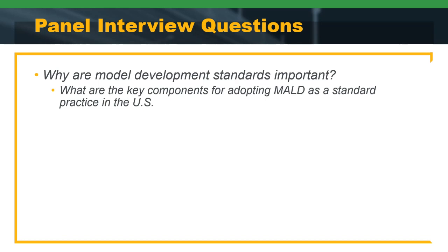But the pieces that we talk about, we take and we look at a foundational definition for level of development, and then we look at a model element breakdown structure, which is like a table of all the elements you might have on a project. But it's important that those are at an element level and not necessarily at an entire model, because Eric needs to know which elements, kind of like the chicken, right? If part of the chicken's bad, then he's not going to eat the whole thing. Well, in our case, we have multiple elements, so we need to let them know which parts are bad, so they just don't eat that part, but they can consume the rest of their meal, right? Maybe the potatoes are fine.